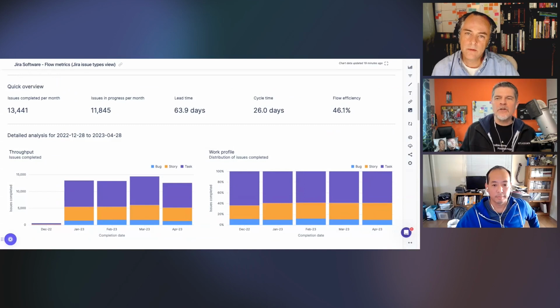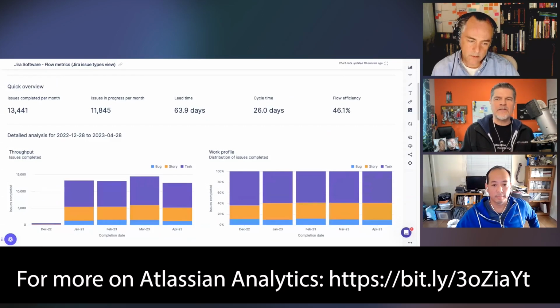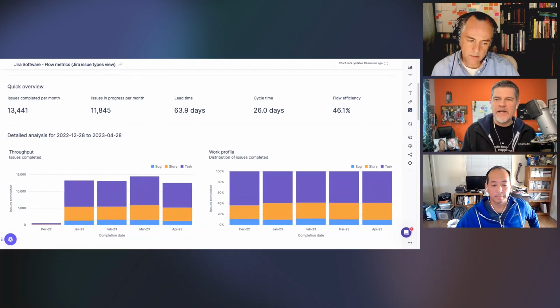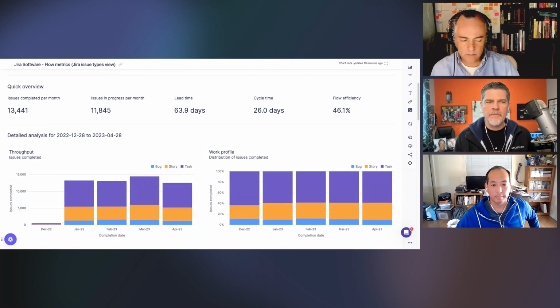Less of it is asking the team how long it's going to take them. If they can understand what it is you're asking them to deliver, then look at past performance, and that is your best indicator. The lagging indicators are your best predictor of when you can expect delivery of this thing. And it would also help us focus energy within the team or teams on right sizing the work, so that it is all very similar in size, because that's going to make these metrics more efficient, right?